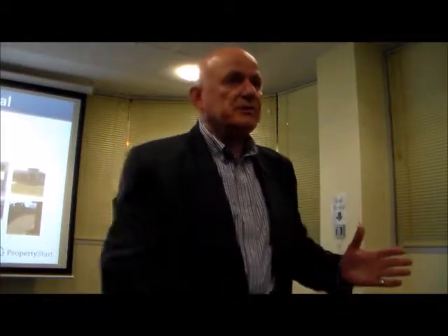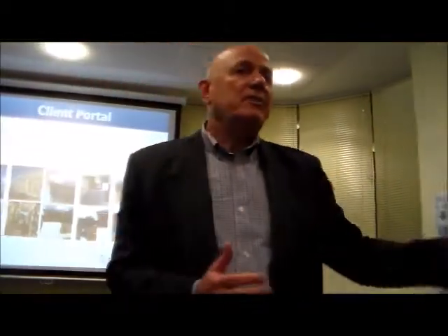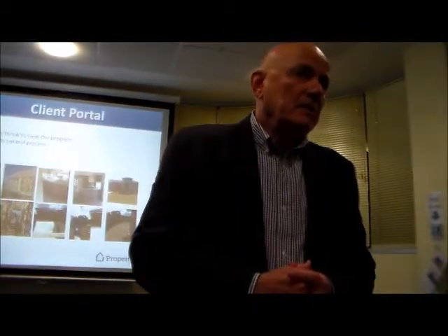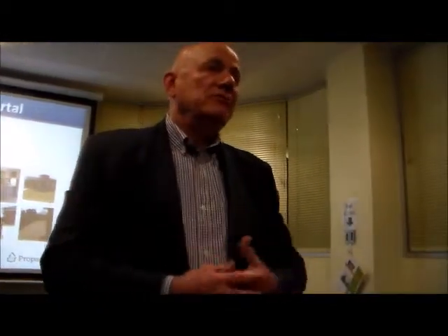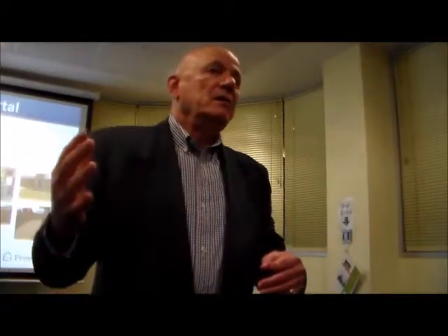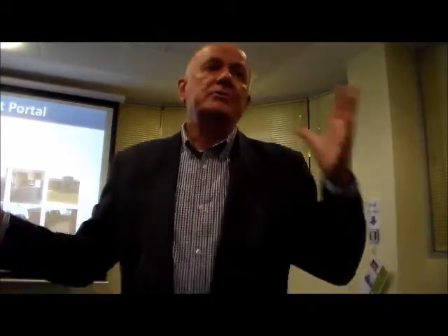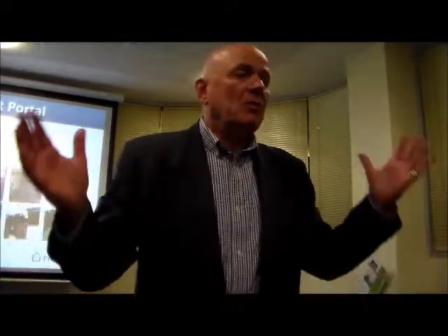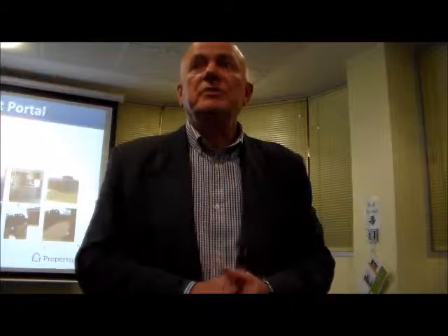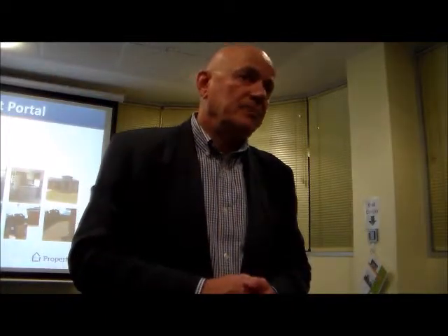So the whole journey, as I said before, is 5 to 9 months, can be a bit more than 9, never less than 5. So you've got to allow that in your developing timeline. You can't buy a block and expect to be on the block straight away doing something. It's quite a process. So you've got to allow for that in your holding costs, or however you do your feasibility, and build that in.